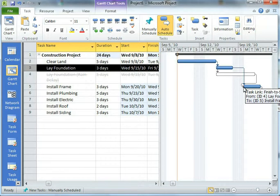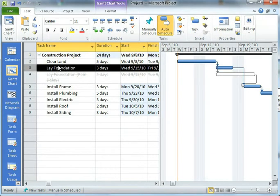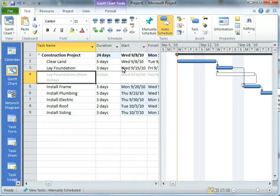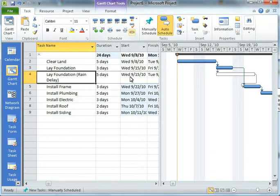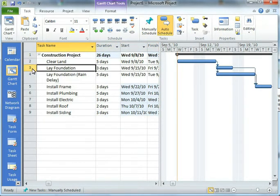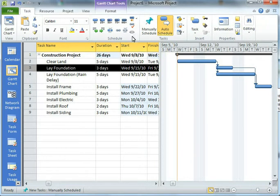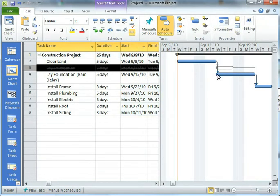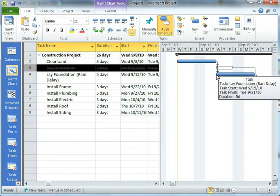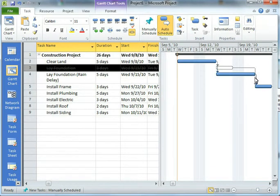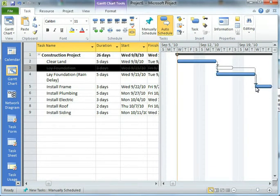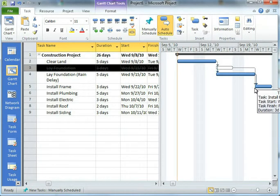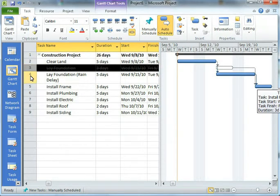My project as a whole is 24 days right now. If I reactivate lay a foundation with the rain delay and instead deactivate lay the foundation, now I can see laying the foundation takes longer. It goes on to Tuesday and installing the frame cannot start until Wednesday. Now my project is 26 days long.